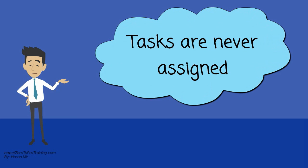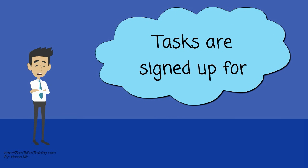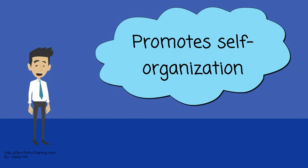Tasks on the Sprint Backlog are never assigned. Rather, tasks are signed up for by the team members as needed, according to the said priority and the development team member skills. This promotes self-organization of the development team and developer buy-in.